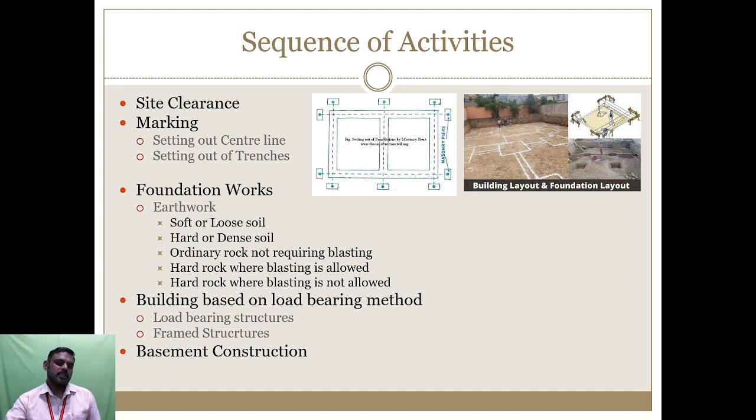Okay, next thing, foundation works. In foundation works, earthwork is a major thing. Earthwork is done based on four or five categories. The first one is the soil type. If it is loose or soft soil, it's possible to excavate in a smooth manner, but we have to go for more depth.